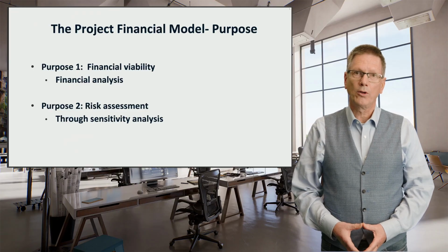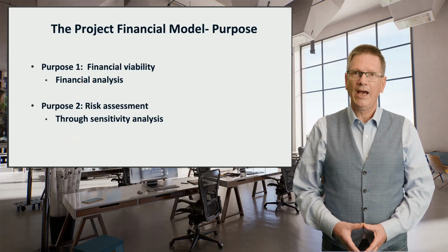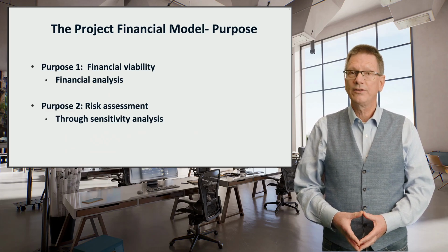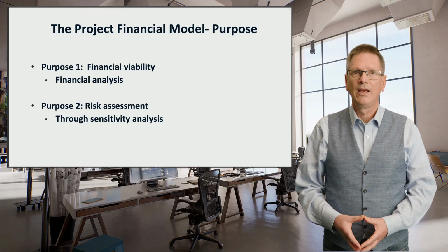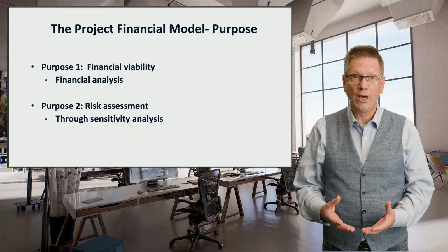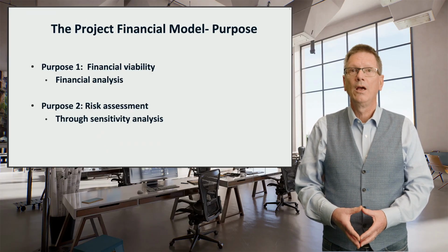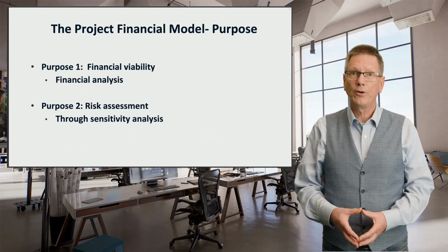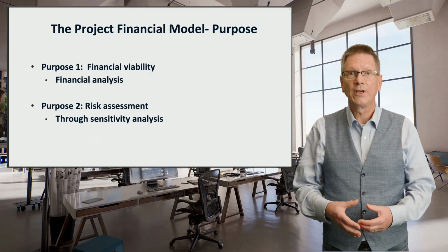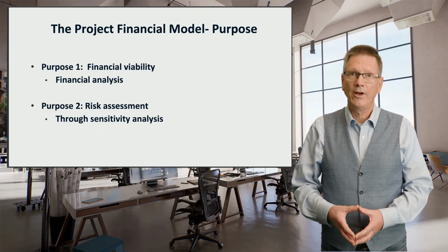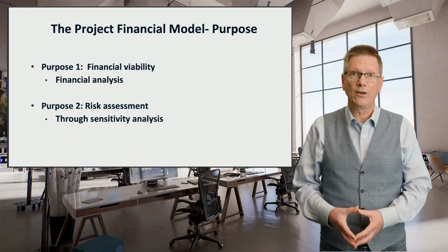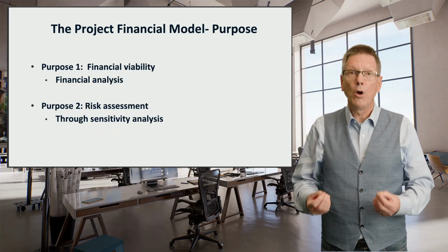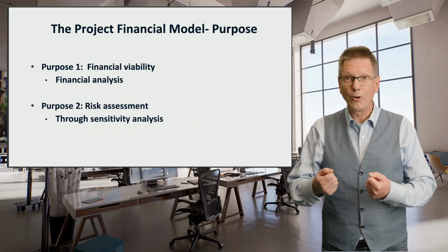An additional purpose of the model is that it enables stakeholders to analyze the impact of a change that could happen in the project. This is called sensitivity analysis, determining how sensitive the cash flows are to specific changes. Such an analysis is important to determine the feasibility of the project, but also as a tool in the process of risk assessment and risk allocation. And finally, because it is also a useful tool in contract negotiations. Thanks to this analysis, we can determine what aspects are the most important for us to achieve in our commercial negotiations.